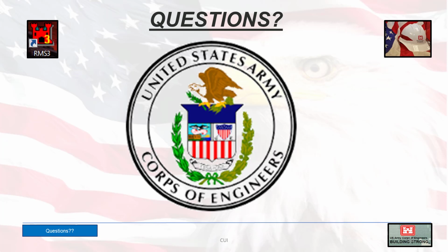You can have the contractor give you a refund. If you haven't approved the payment in CEFMS yet, you could always redo the payment in RMS and correct it. But if you've already paid it and at that point you need the refund, you have to go through Millington on that, and it is sort of a hassle, but you can get it. There would be other ways that you could try to shift some of those costs, but you would definitely have to speak with contracting and Office of Counsel.